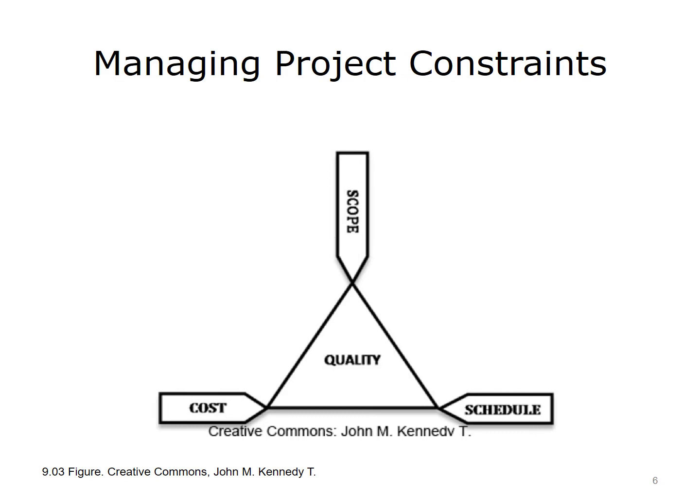This project management triangle, also known as the triple constraint, illustrates how the relationship between the 3 project constraints of scope, schedule, and budget work to ensure the success of a project. As you can see here, one side of the triangle cannot be altered without affecting the others. So if there is a change to one of the project constraints, such as the project schedule, you must evaluate potential impacts to the other project constraints. Fortunately, there are a number of tools available to help you control changes to these elements.